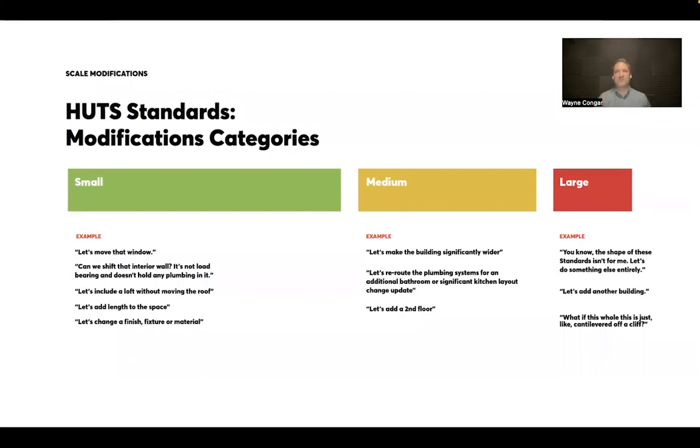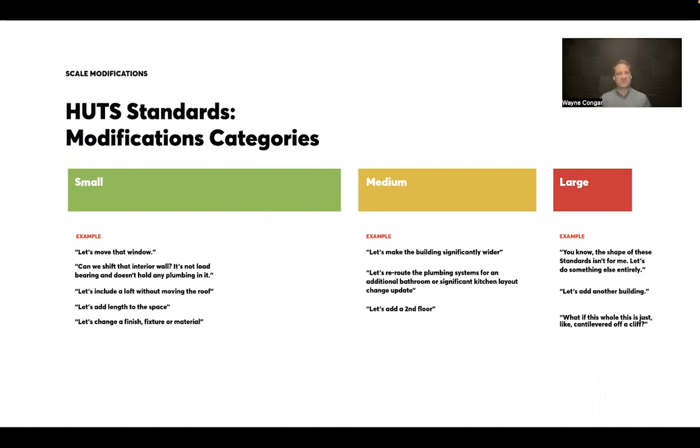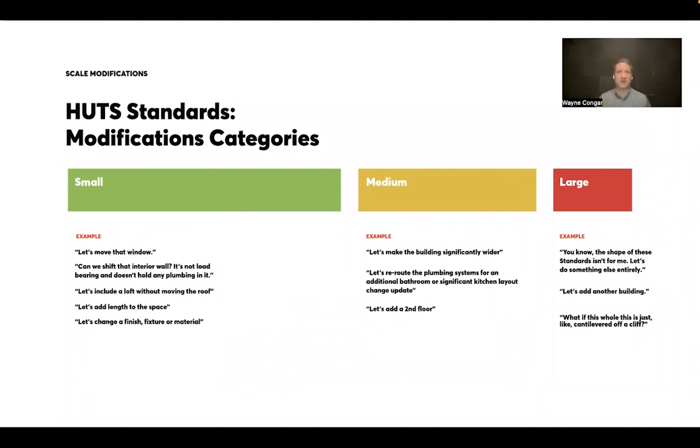Then we have what we call kind of medium modifications. So things like, hey, the building today is, say living, kitchen, dining is 18 feet wide. I'd love if it was 30 feet wide. And so this starts to get into a place where we're rethinking some of the roof structure. We're rethinking the truss sizes. There's some structural engineering here that we'll bring in our consultants for. It's still sort of within the same scope, but tends to be a little bit of extra time that goes into our consultants providing good guidance on the structural side. Let's reroute the plumbing system for additional bathrooms or significant kitchen changes or major layout changes. On the bathroom side, that matters because we might need to revise the plumbing plan or revise how that plumbing routing works. It might impact the septic design you initially had.